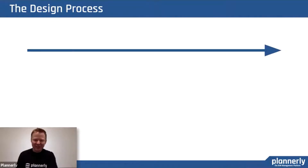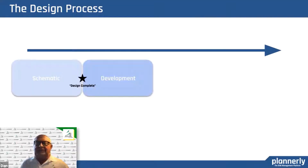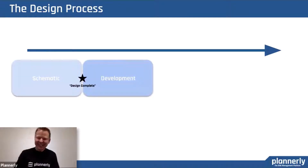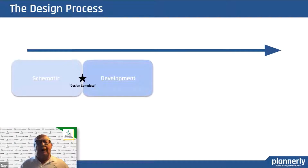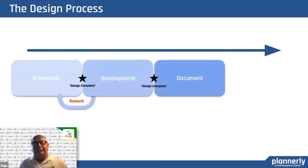The design process is a linear process — aspirationally. It's supposed to start with schematic design, then at some point that's complete and we launch into DD, and we're at 50% DD — the definition of which no one agrees on — and then 95% DD. But actually, are we? The problem is the owner changes his mind, and we're back into rework. So we're starting over, looping, with a deadline to meet.